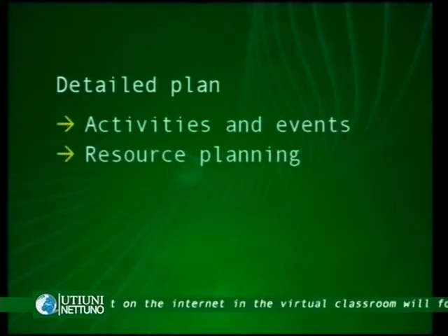But when it comes to events, we can have also some unexpected events that could be included in the detailed plan. In such a situation, we have the so-called if-then scenarios. So if something happens, then the plan itself is giving some backup solutions. Resource planning. For each activity and events, some resources have to be deployed. So it's the scheduled and precise usage of such resources.